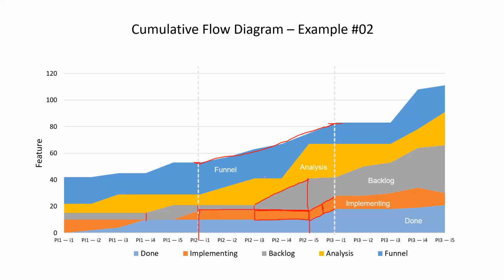You got it, Aman? Satish, with the WIP limit, is there any restriction that XYZ tasks should get completed within a certain time period in Kanban? We call it no. That is a different category altogether. If we define SLAs or classes of service, then that specific timeline should come up.